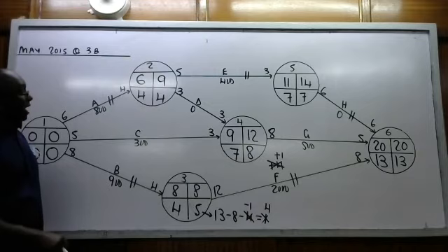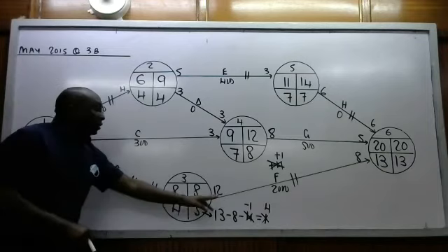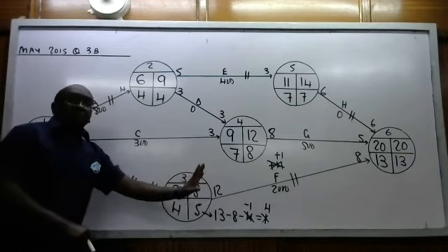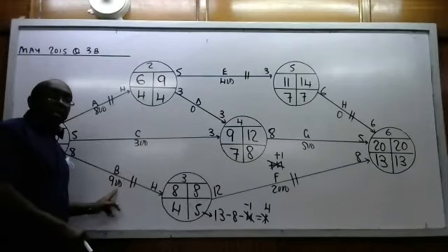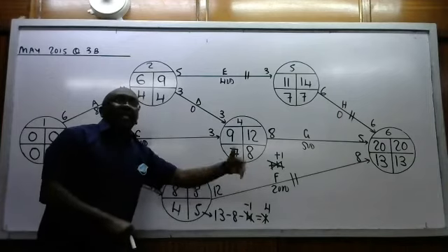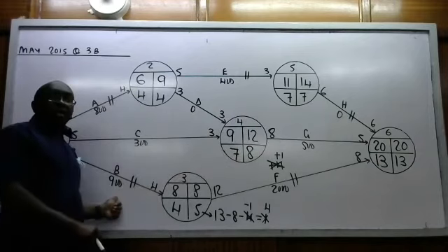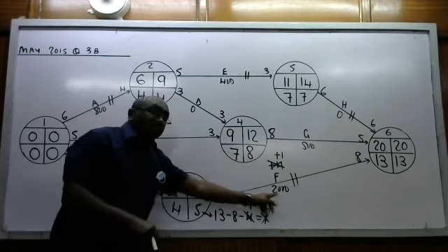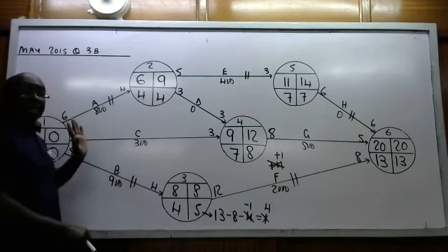After F, the next one is B. But going by what we have said here, it is not possible to return anything to B. Because if you return anything to B, then it will affect F. And because F has a higher cost, we have preferred to have F returned than B. It is better to save 2,000 than to save what? 900. So B is as well done.